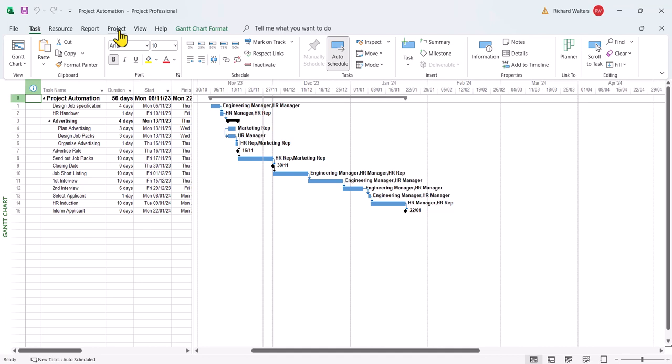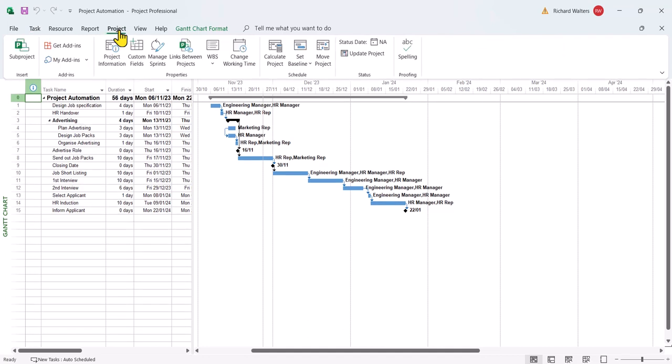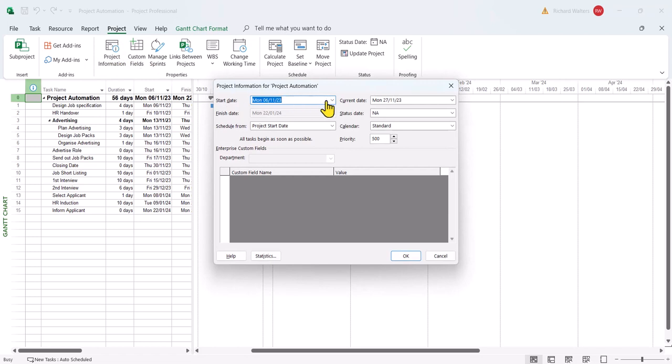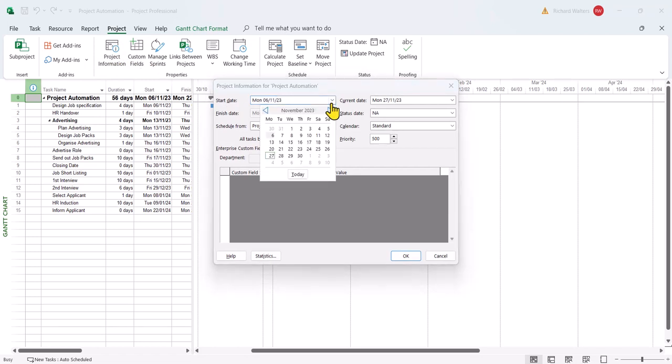So project tab, this time project information, and the start date we're going to update to the 4th of the 12th.